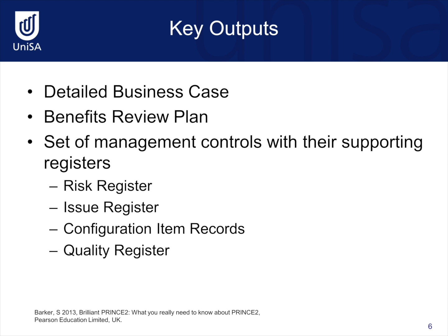The key outputs of this particular process are the detailed business case, which has all the information completed as far as possible. A benefits review plan is also produced because we need to be able to have a plan of when we are going to establish and determine that the benefits have been realised.